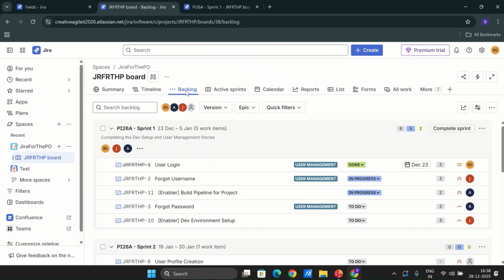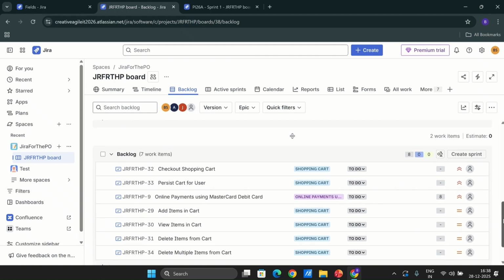What we learned in this video is how we can use this particular priority field simply by clicking on this field and setting the right priority, which is agreed and in confirmation with the product owner. And also, if we are playing the role of a product owner or business analyst and we want some tips to organize our product backlog, there are two ways to utilize. One is obviously by using the priority field, and the second, in the simplest way, is place the items which need the team's attention on the very top, so that the first top 5 or top 10 are the items that we want our teams to start, maybe discuss during the refinement, or select them for the development.